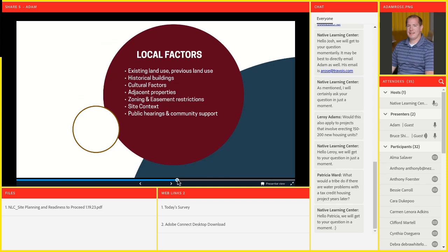That's where that Phase One Environmental Site Assessment comes in, because it'll look back in history to see how the site had previously been used. And if there's documentation of structures and what they were used for, then you can focus your on-site investigations to make sure there were no spills, no underground or aboveground storage tanks, et cetera. So you can be proactive versus reactive, because anytime you're in a reactive situation in construction, it's really expensive.